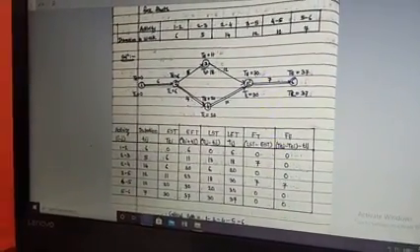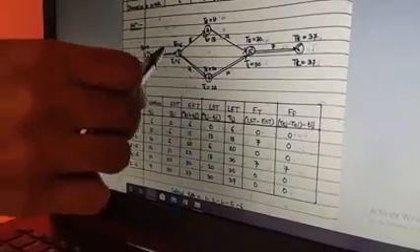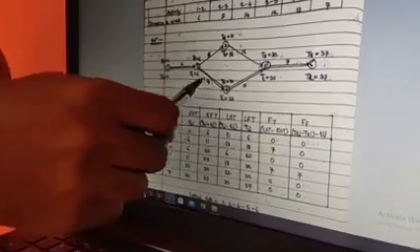So now consider the second one, 2 to 3. Again, this particular activity is going to end after spending 6 weeks in the first activity and then 5 weeks in the second activity. That is nothing but 6 plus 5 is equal to 11. So that is why I have written EFT for the second activity as 11. Now consider the third one, that is 2 to 4. Again, if I want to determine EFT for this activity, I just have to add up these two. 6 plus 14 is going to be equal to 20. After 20 weeks of duration, these two activities will be completed.